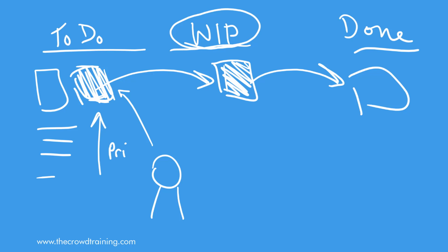Consider right now, if you are taking this lesson but at the same time doing another activity or reading or taking care of something else, well, you are distracted and you are actually not getting all the work that you need to be focused on and being productive and effective and efficient, because it is a misnomer about being able to multitask. That's why in best practices in Kanban, we usually try to limit the work in progress to 3. So if that's the plan, you could be working on up to 3 things at one particular time.